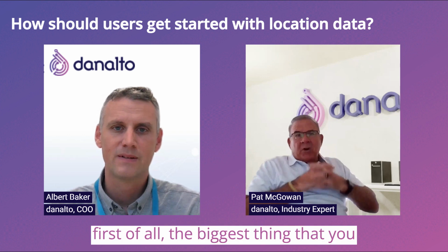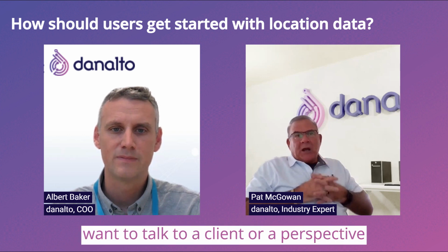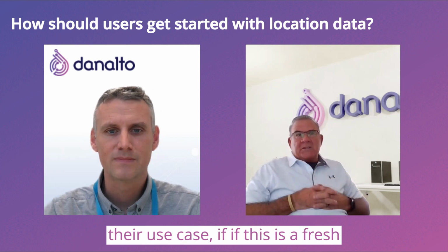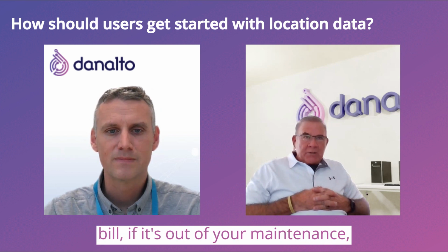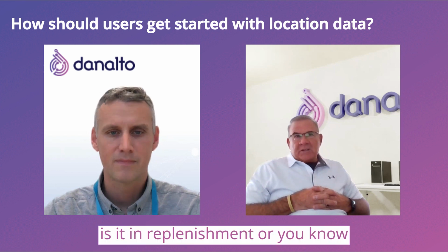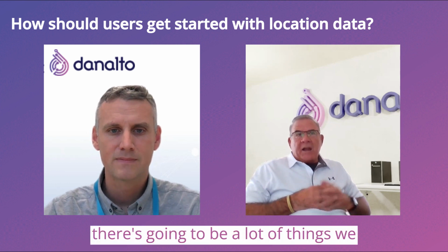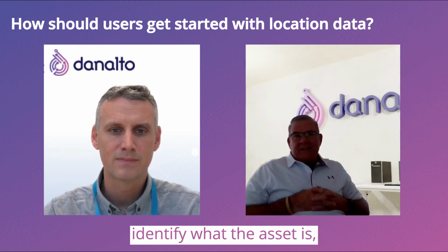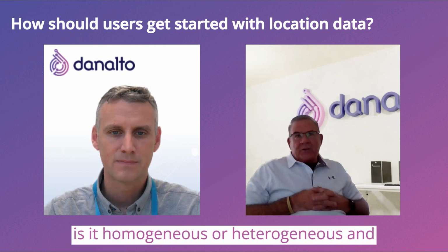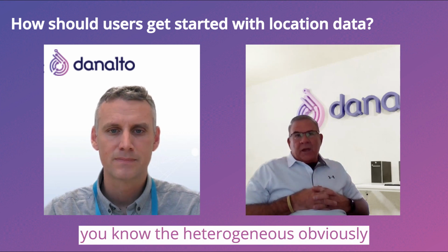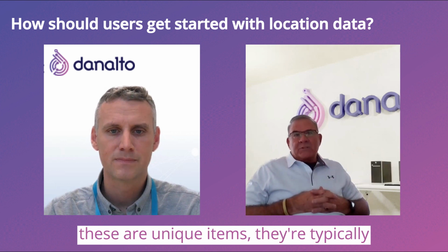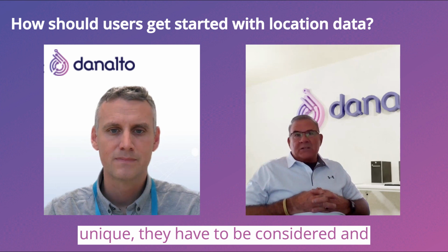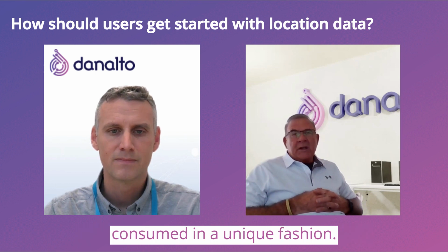Well, first of all, the biggest thing that you want to talk to a client or a prospective client about is, what is their use case? If this is a fresh build, if it's outage or maintenance, is it replenishment? There's going to be a lot of things we need to talk about. You also need to identify what the asset is. Is it homogeneous or heterogeneous? And the heterogeneous, obviously, these are unique items. They're typically built one-offs. They have to be considered and consumed in a unique fashion.